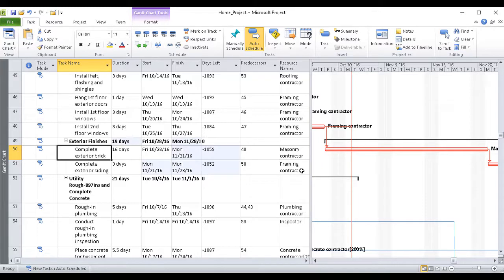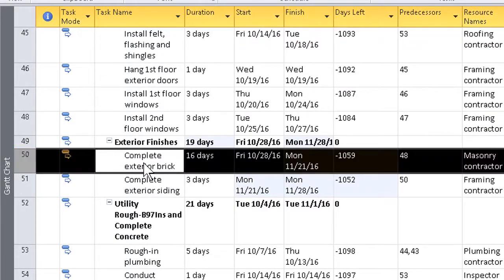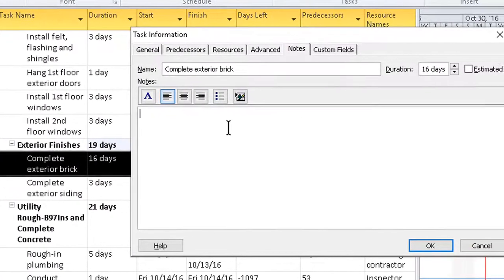Make a note in the Task Information box for that task as to why the split occurred. It's very straightforward — just double-click the name of the task.